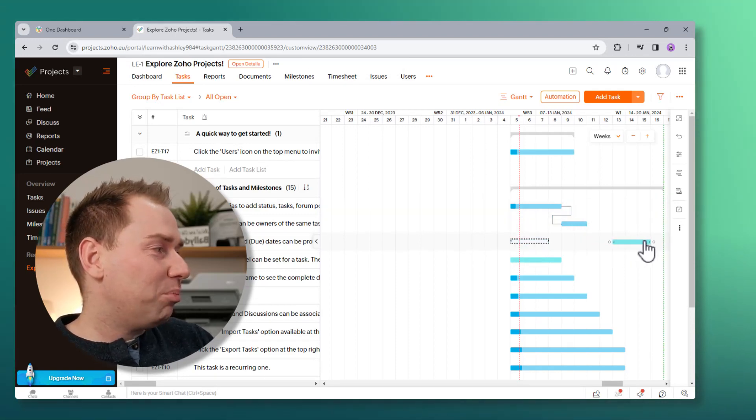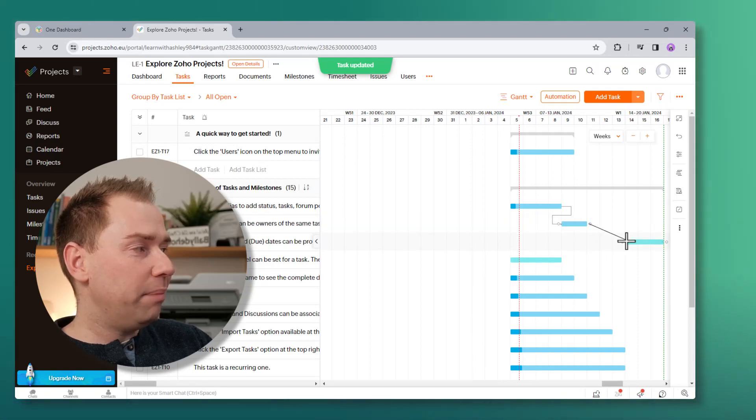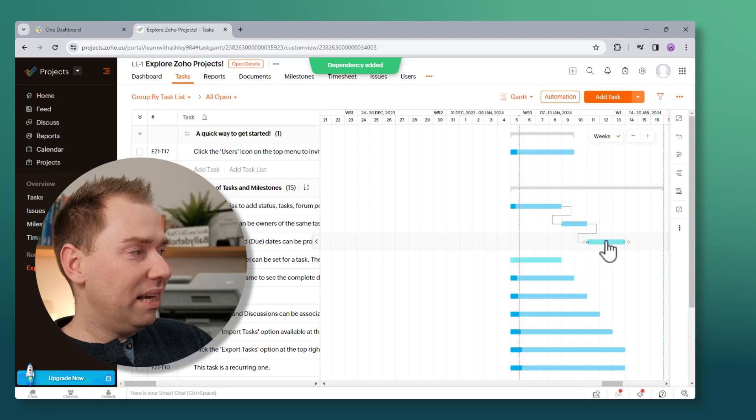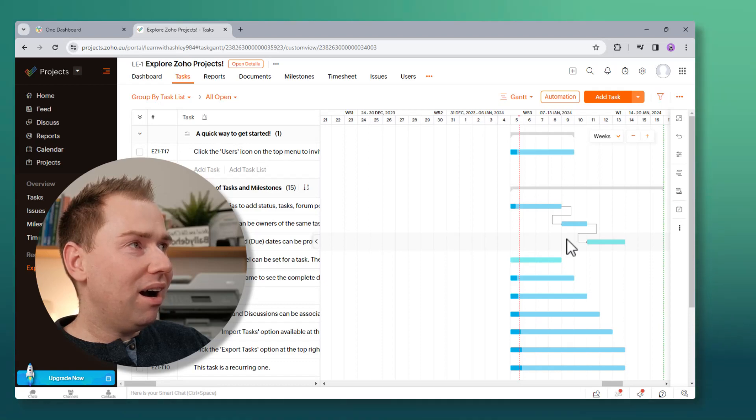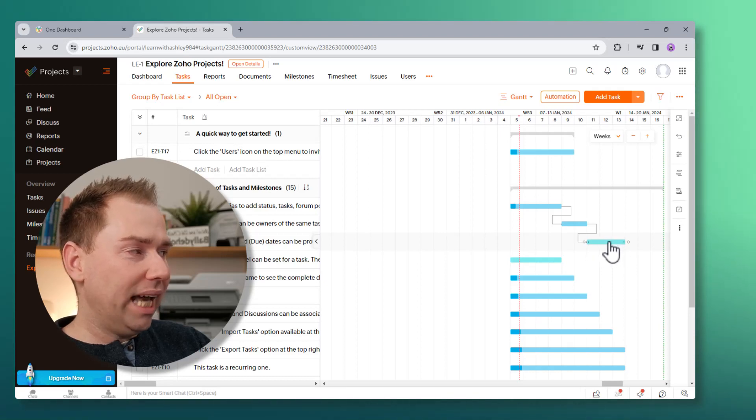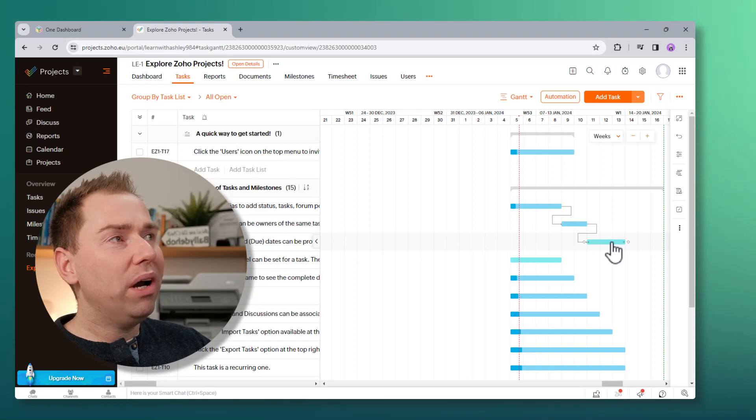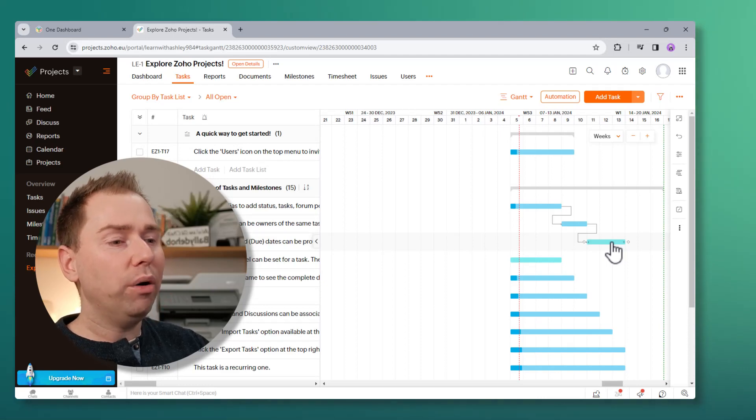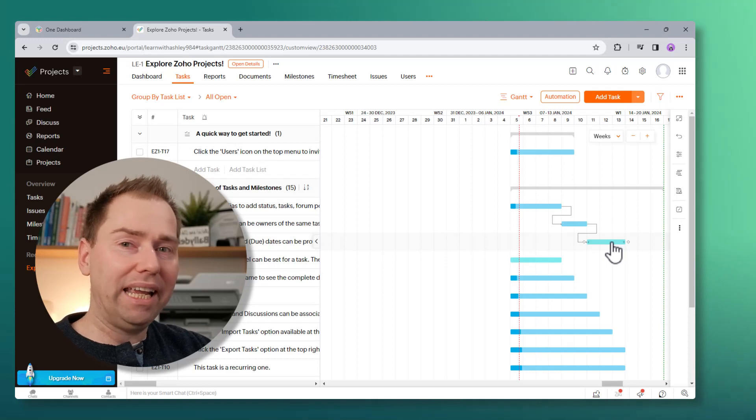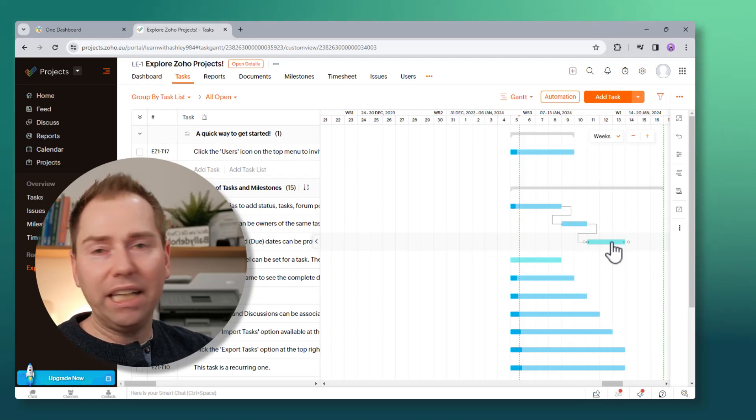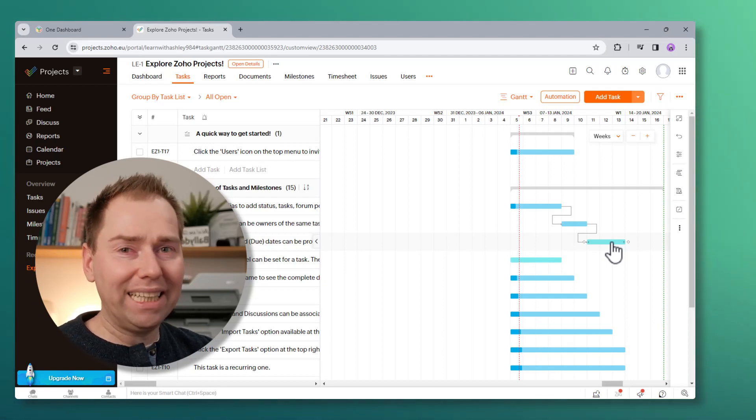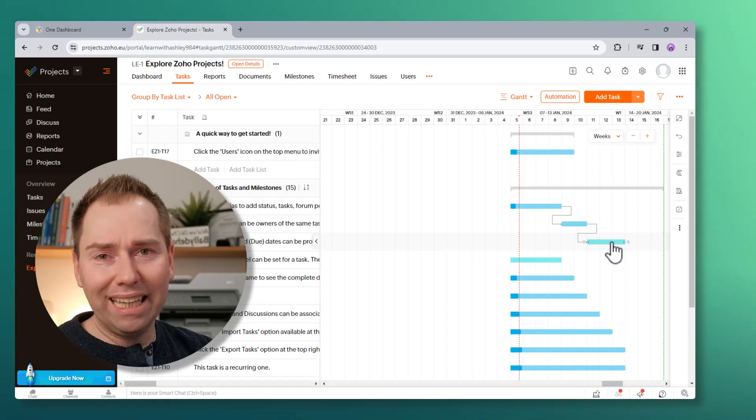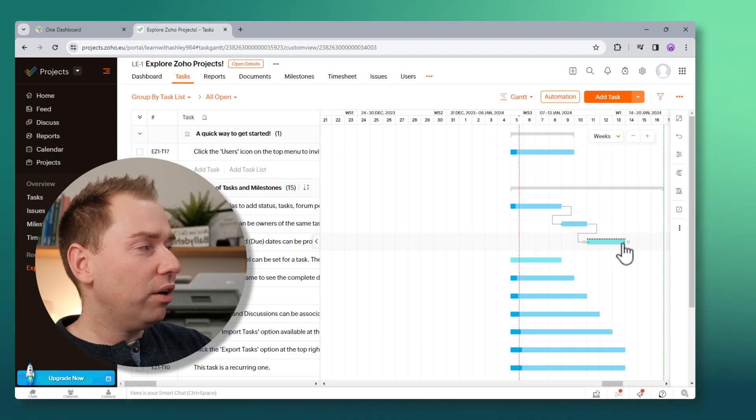If I set a project task a couple of days later than the previous task, and then I create a dependency between the two, it pulls this task back. You can change a setting so that it doesn't do that. But I have not been able to find a way that you can stop it moving the task altogether. So an example of where this might be important is if you're working with third parties and you've booked a third party in to do a task on a specific day, or you've booked, you've had to make a booking that there's a task that has to happen on a certain day and it can't move unless you go through some kind of procedure to change your booking.